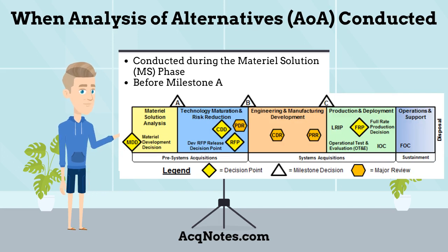When is the analysis of alternatives conducted? The AoA is conducted during the material solution and analysis phase before milestone A. The final AoA, supporting a milestone A decision, is provided to leadership no later than 60 days prior to the milestone meeting.